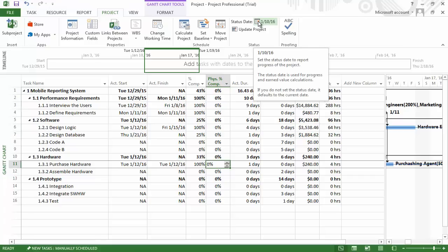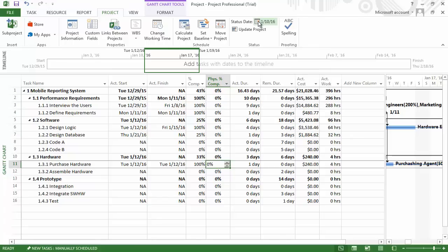Since having an incorrect status date will give you incorrect earned value performance information, it is very important to double check it and make sure that it is entered correctly.